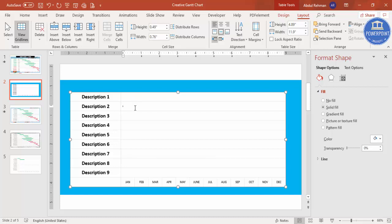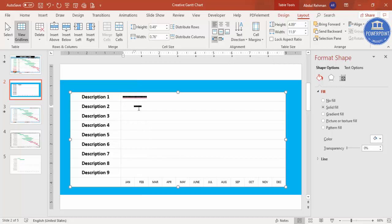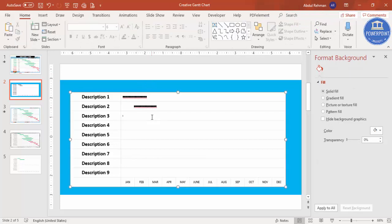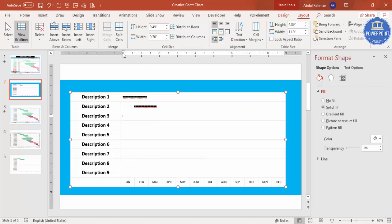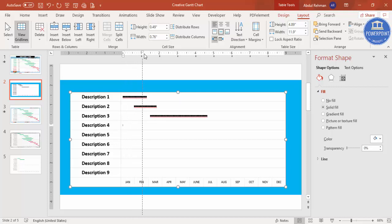For example, description one runs from January to February — type 'g' across those cells. For the next phase starting from February, use the ruler at the top to position the text at the correct month, then type 'g' for however many months it spans. For a phase starting from March going four months, move the tab stop to March on the ruler and type 'g' accordingly. This way you can simply add all your project schedule bars.